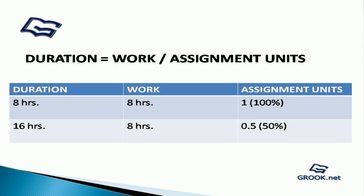For a resource who works 8 hours a day, if he works the full 8 hours on just one task, then the assignment unit is 100%. If he works for half a day on a particular task — that is, for 4 hours — it is 50%.